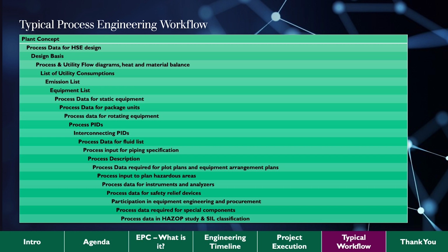But at the end of the day, there might be standards and codes, and then on top of this, there is extra privilege on top of that. So the customer might actually be way more strict on a given piece of equipment than the standard and code itself. And once that design basis is completely agreed upon, that's where the process engineers start doing their fun work that we have learned in school.